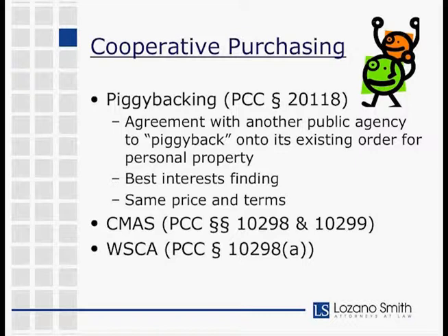A less obvious example is that there's a lot of piggybacking going on with out-of-state contracts. And so what sometimes happens there is that the out-of-state contract has a clause in it that says, for example, any dispute will be decided in the courts of Minnesota. And that's something that we typically recommend school districts not accept, because if there is ever a dispute, the district doesn't want to have to go defend or prosecute a lawsuit in another state. So that may be an easily negotiable term with the vendor, but at the point that you're changing a term, it is not clear that you're still following the requirements of the piggybacking statute, because now technically you've got different terms in there.